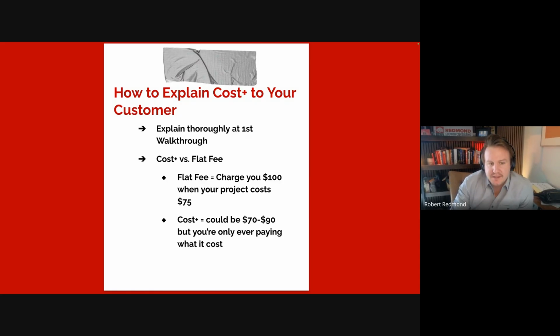As a cost plus contractor, we may estimate your project at $80, but the project could go as high as 90 or as low as 70. Either way, you're only paying for what the project costs, right?